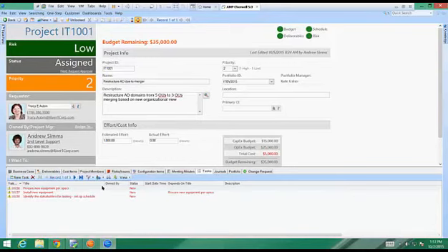You can have tasks associated with the project. In this case, we already know there are a couple of tasks: get the new equipment, install the new equipment, which is dependent on the prior task being completed, and set up a testing schedule. Those tasks, as they're assigned to people, show up in that team and that person's dashboard on the front dashboard view of my work.